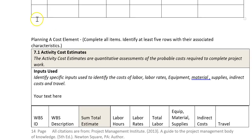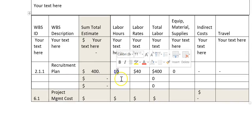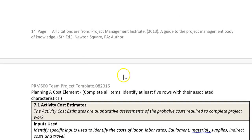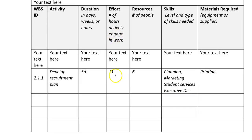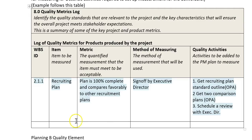Let's see what else that impacts. We also had planned cost. Before we had 10 hours and now we have 11 hours at $40 an hour, so our effort is now 11 hours — that's $440 for the total labor. You can see that for this particular part, adding quality almost always increases the cost, but it decreases the mistakes, errors, rework, and flat-out failures from not having planned correctly. So that's it for planning quality.